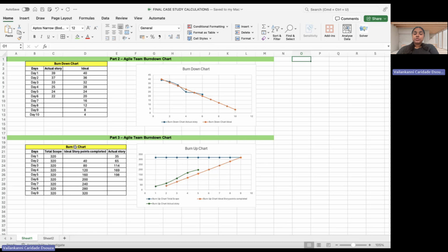If scope increases to 350 points, it would take nearly 9 sprints instead of 8. To manage this, we'd reprioritize the backlog and shift lower value features to future releases. To stabilize the velocity, we should limit overcommitment, avoid multitasking, and encourage team communication and psychological safety. Daily stand ups and retrospectives can help maintain momentum.